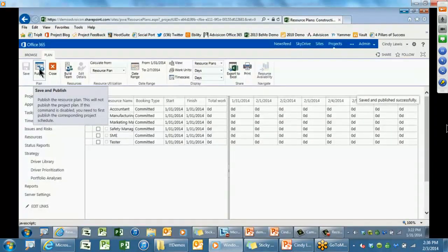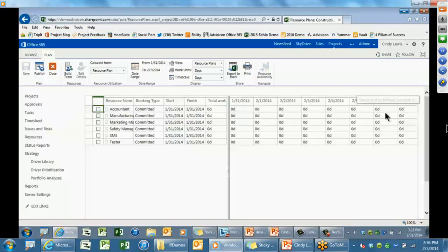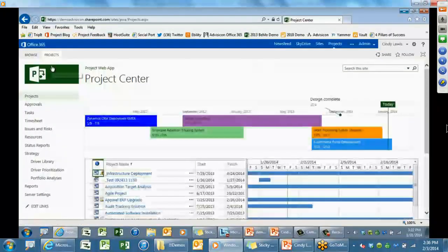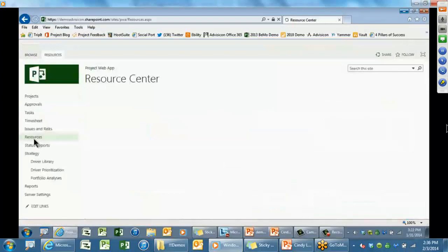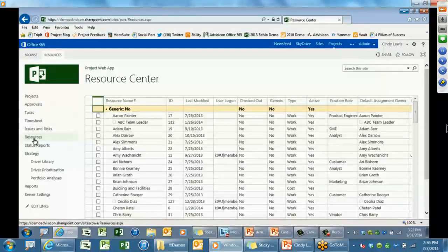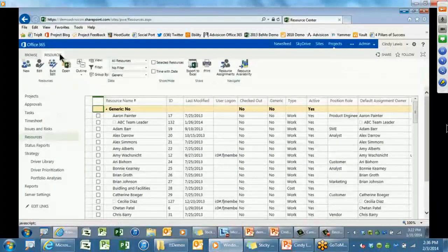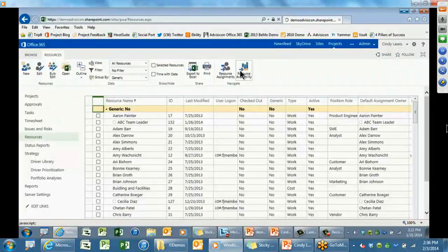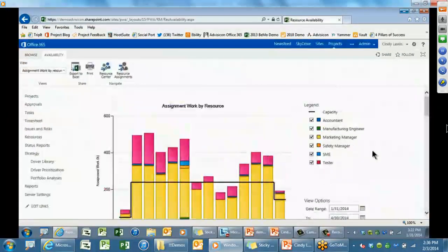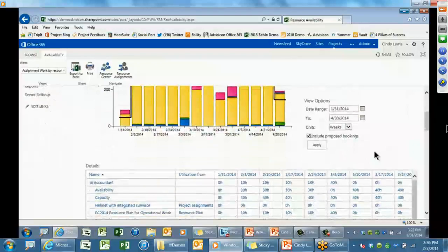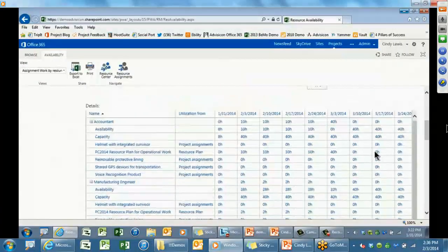So did everybody see what's happening here? I'm setting things up. And here's a critical piece: in that drop-down list, you can do project plan until, or you can do resource plan, flipping off the schedule temporarily for planning for operational work. I have a customer that's doing that right now. They said, you know what, let's turn off the schedule, flip to the resource plan, forecast the future, then once we've got that set, flip back to schedule. That's another scenario. So there's lots of approaches.